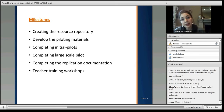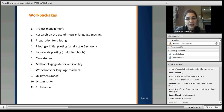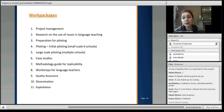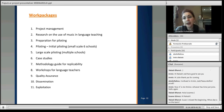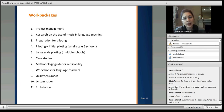Completing large-scale pilots, completing the replication documents, and teacher training workshops are the project's key goals. The project is divided into work packages, each following the previous one, with some running for the whole project duration. The work packages include: project management, research on the use of music in language teaching, preparation for piloting, initial piloting, large-scale piloting, case studies, methodology guide for replicability, workshop for language teachers, quality assurance, dissemination, and exploitation.